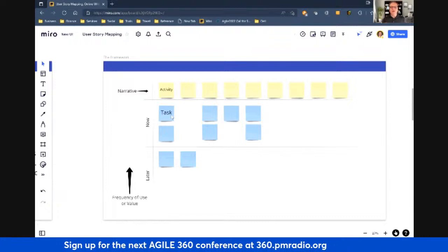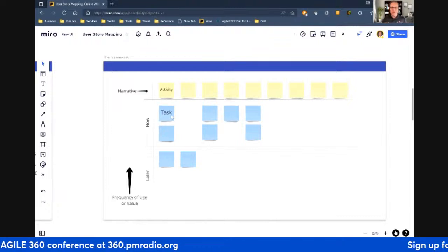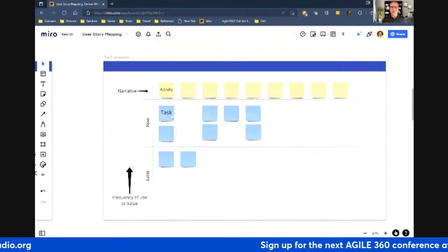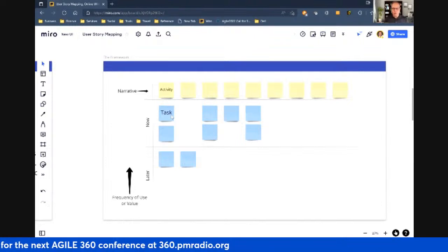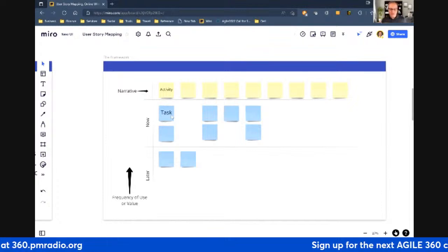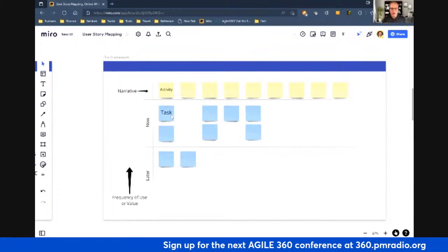So when you walk up to the coffee maker and you push that button to turn it on, think about the user stories that you're going to have to implement to do that. It enables the heating element. It verifies that there's water. Blink the light if there is no water, right? Get prepared for when the user is going to push the button to get the coffee, right? So the individual things that need to be implemented to enable turning on the machine, right?